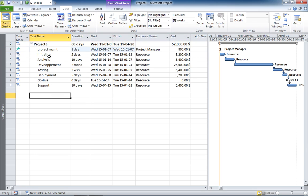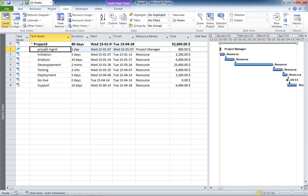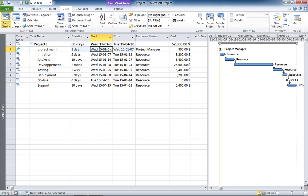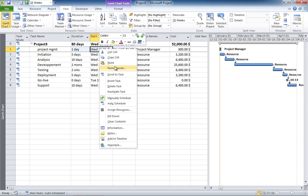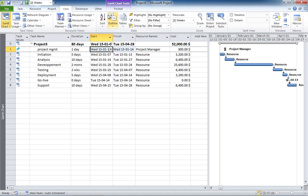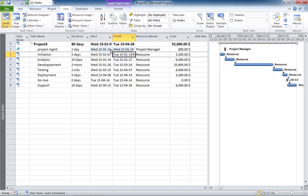This will remove some little quirks. Now, he starts at the beginning of the analysis, so let's select this cell, copy, and here you will need to do a paste special, paste link. Now notice the little triangle here at the bottom right of the cell. That means it's a dynamic link.